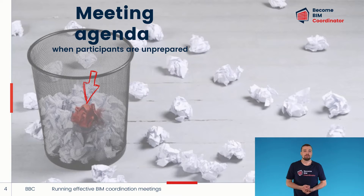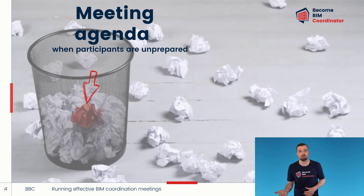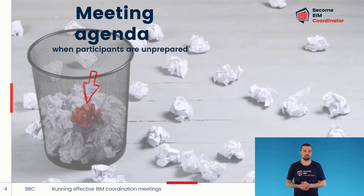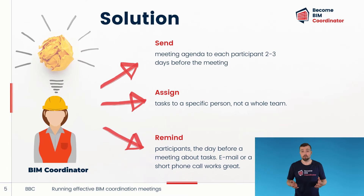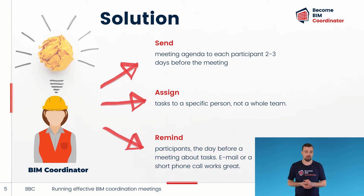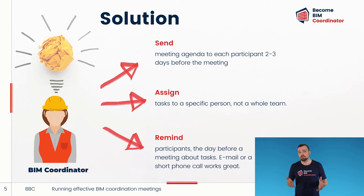When this happens, it is easy for team members to argue about who is responsible and blame others instead of finding the right solutions. If you would like to prevent this from happening at BIM coordination meetings, take note of the following best practices. First of all, the BIM coordinator who organizes the meeting should send the agenda to each participant beforehand. The agenda must outline exactly who is responsible for each meeting part and how they need to prepare for it.